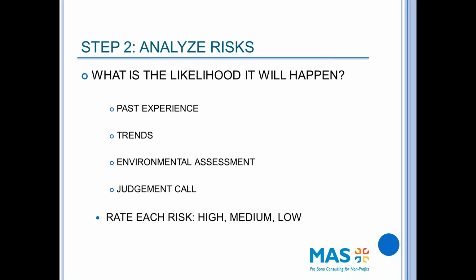So the first thing I need to come to a decision on is, how likely is it that this would happen? And how do I do that? Well, I look at past experience. Has it happened before? Is a question you could ask. I would look at trends. Do I hear about it happening more or less? Have I heard about it happening in organizations like mine? I think about the environment. Do I see that risk happening? Do I think there are things happening that would increase or decrease that risk? And in the end, it's a judgment call.